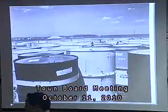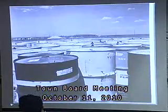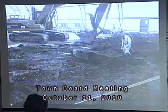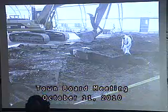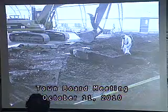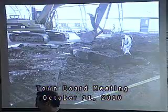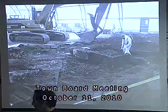The 903 pad, which I mentioned, this is it in the 50s or 60s. This is a picture. You can see the tent around the outside there. They actually tented different sections as they worked. It had negative air, so if there was an air leak, air would rush in.